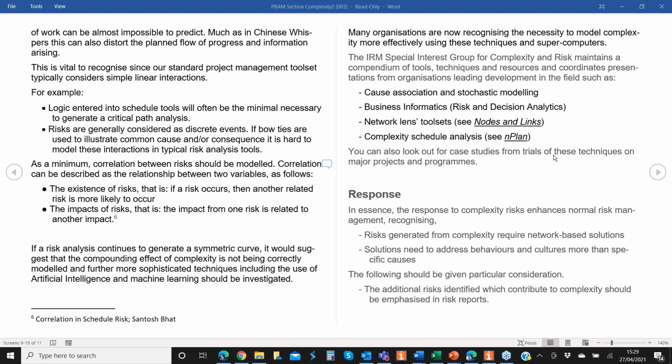Yes. I did talk about contracts in the last section, actually. But I think you're right. I think there's something more we could put in about contracts creating another layer of complexity, because they create artificial boundaries between organisations, accountabilities, and also the subcontracting of those contracts. There are some organisations that literally fixed price subcontract things out and don't care, because if something happens, they'll just sue the subcontractor, and it's like you said, it's very difficult sometimes.